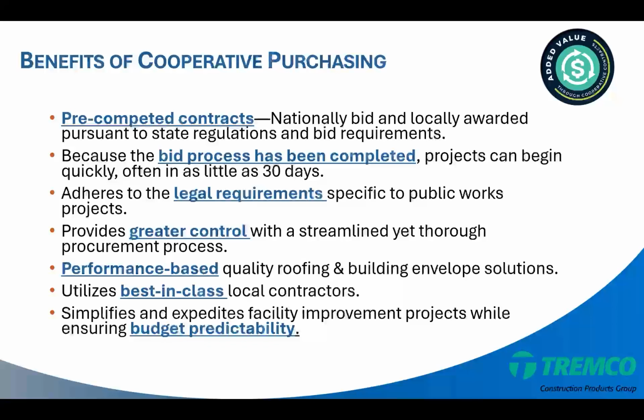So in many situations, if you're using a turnkey project, we can show you what the all-in costs are before you even make your decision, which is not the case with traditional bid scenarios where you're trying to meet a budget and many times have change orders and other issues that come up. So ensuring that budget predictability is extremely beneficial and is really welcomed by many school districts that we work with.